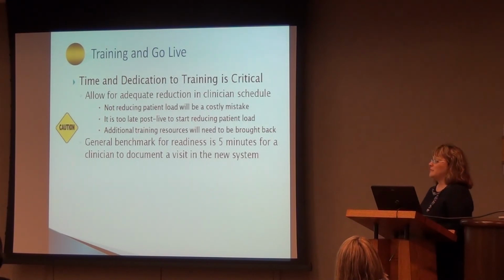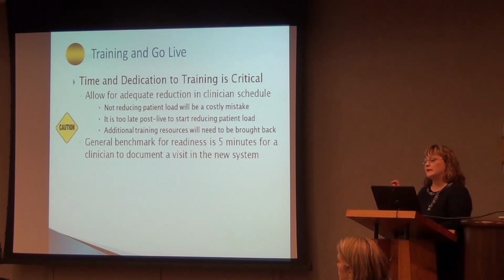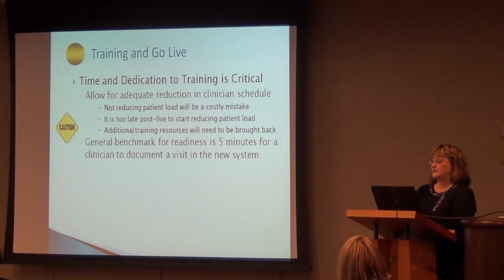The general benchmark for readiness to go into an exam room with your tablet or laptop, or if you have a desktop in there, is you can do a visit in 5 minutes or less. If you can do the visit in 5 minutes or less in your test system, you're good to go. When Med-Al is implemented, we actually do a staged approach now because it's too much to do all this at once, so we've staged it.